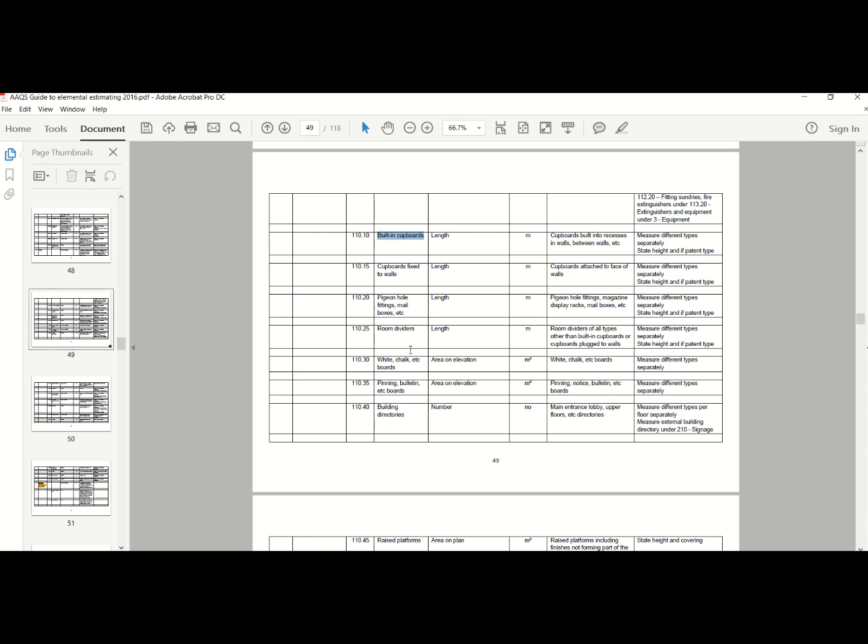You might even get the cost of cupboards from Lotus Pine, or even from Builders Market, or any place like that. You might get an idea or feel of cupboards, and you try and take that rate, add the installation cost, the labor cost, the margin of profit. Also, you just make an allowance there. You can use your discretion on that. I'm not going to mark those items too strictly. The main thing is that it should be in the ballpark, more or less.